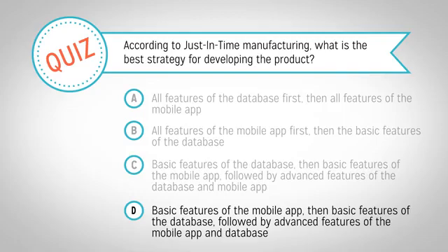The reasoning here is to discover flaws early in your design, after building a first version of your product. If you had built the entire product before being able to test basic features, you might discover that those basic features weren't needed in the first place. If that's the case, then all of the previous work would have been wasted.